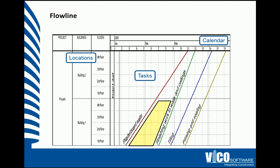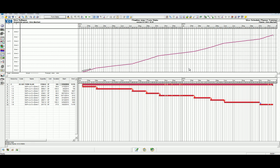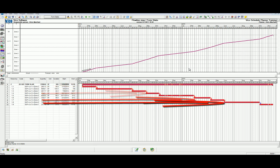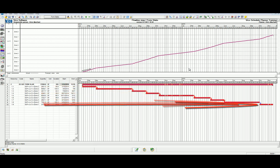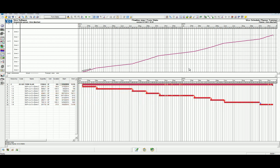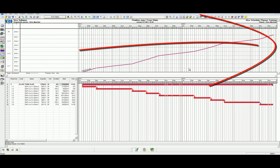Let's get to scheduling. It is important to convey that each task location is a separate activity, and is traditionally represented as a separate line on a Gantt chart. Flowline recognizes the fact that each task location should be connected, and therefore the default behavior is a continuous flow between locations.